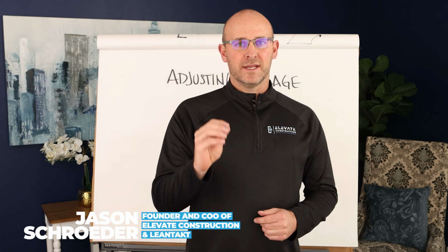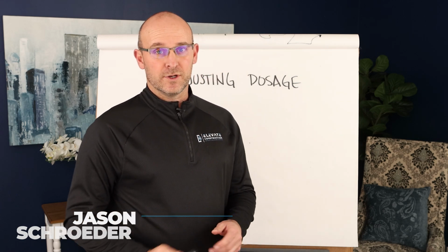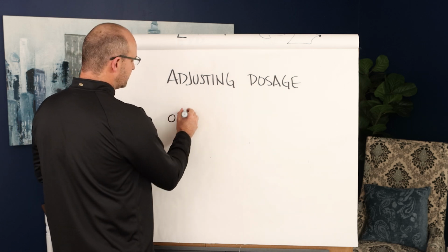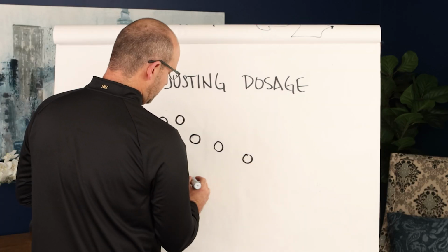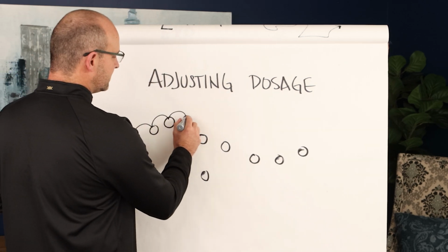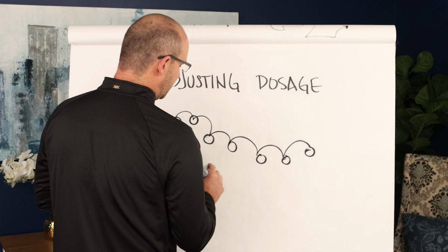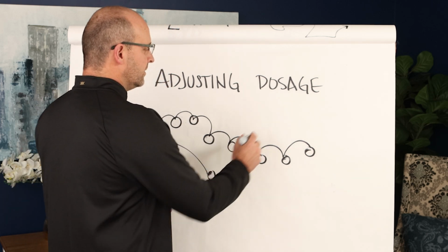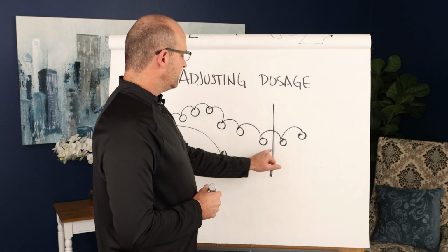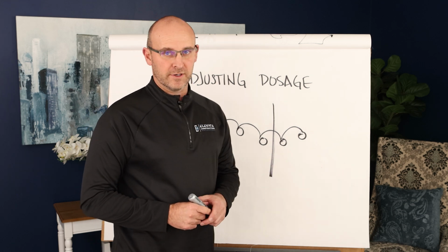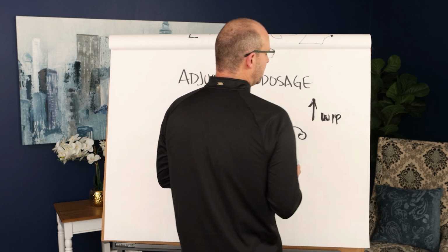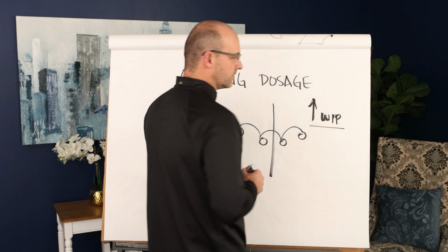The best way that I can explain dosage would be in this way right here. Let's say, for instance, that you have multiple things that you're doing and you need to do those well, right? But when you do these tasks, you're not spending enough time to actually finish them. So by the time you get down the line, instead of just having 2 left, you have 2 plus a lot of unfinished work, right? This results again in increased work in process above the capacity of resources, and that's a problem.